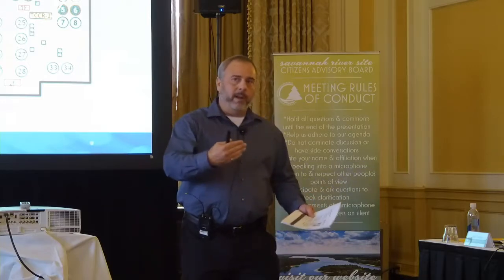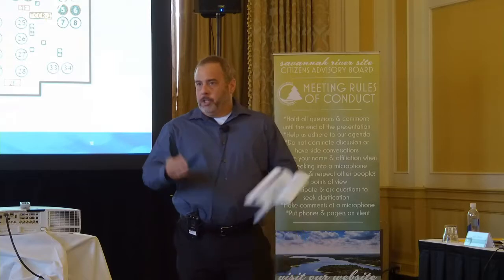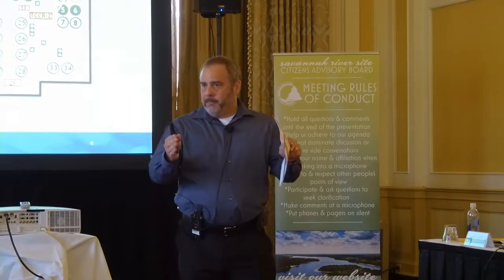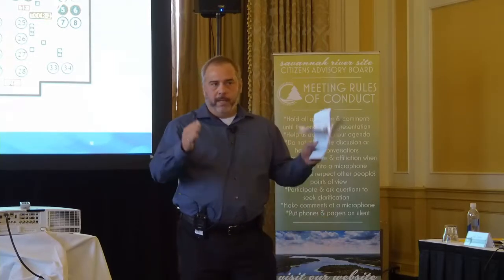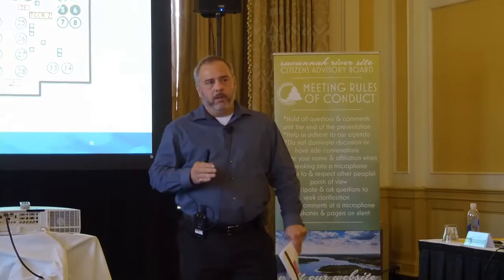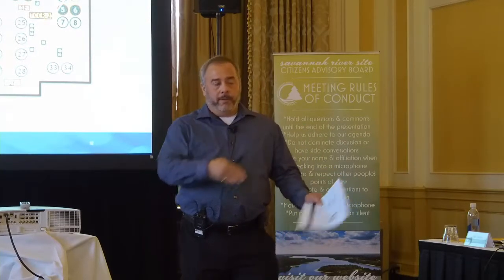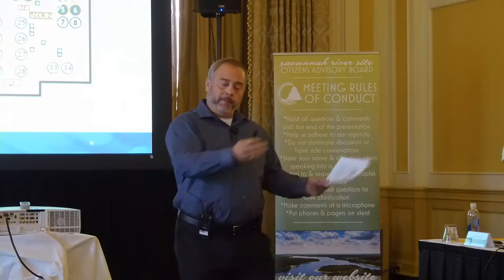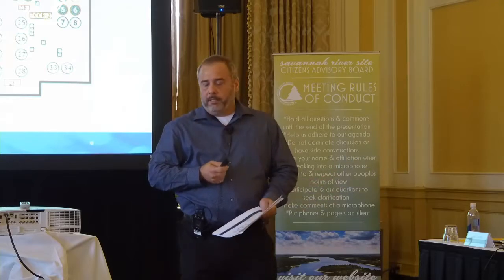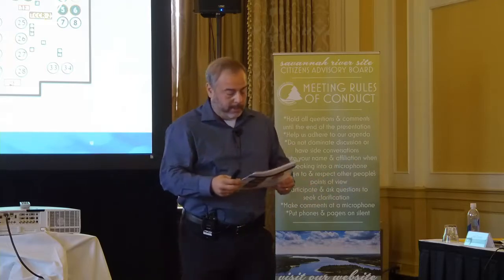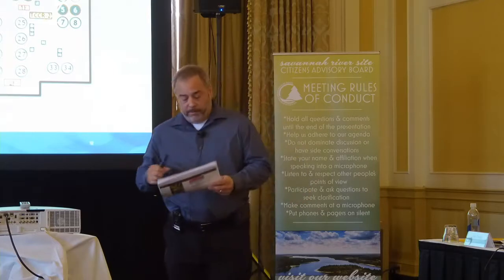These are the 4 that were procured just for the Tank 10 demonstration. We're going to need about 16 more to do Tank 9, so we have to go procure those. Plus we have to procure the new resin that's going to go inside those columns. And like I said, all 3 of those procurements are working. They're at different stages right now.